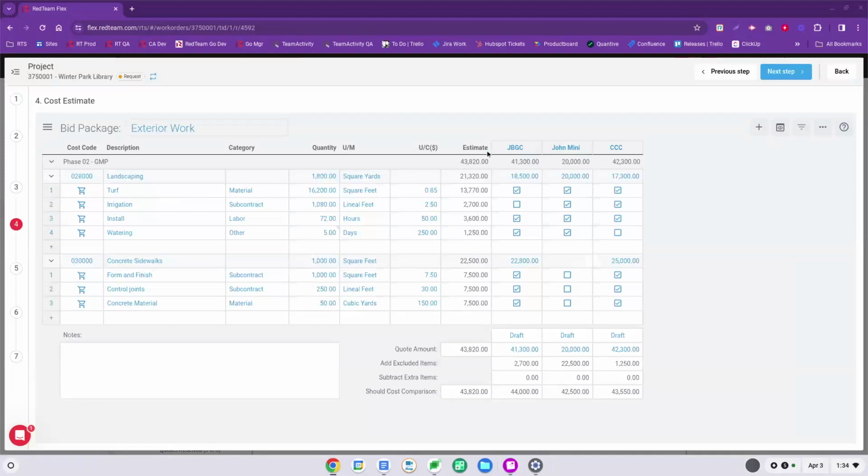All right. So again, I put together this bid package thinking that I plan to ideally contract out this work to the same bidder, and that's why I built the bid package this way. Of course, like Neil said, I can always add more cost codes to a bid package as needed and adjust it at any point. It doesn't have to happen before I send this out or anything like that. I can be adjusting this as we go. Again, we're going towards a more collaborative model here, and so thinking about how we buy out the job is important.